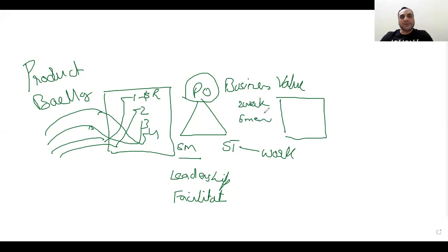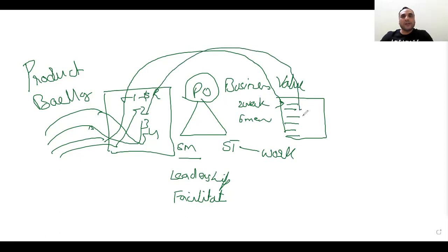Now, these 6 members will take user story 1 and then they will decompose this user story, how many tasks they will do to complete this user story. If they think these tasks can be finished before 2 weeks, they will take another user story and decompose it also.